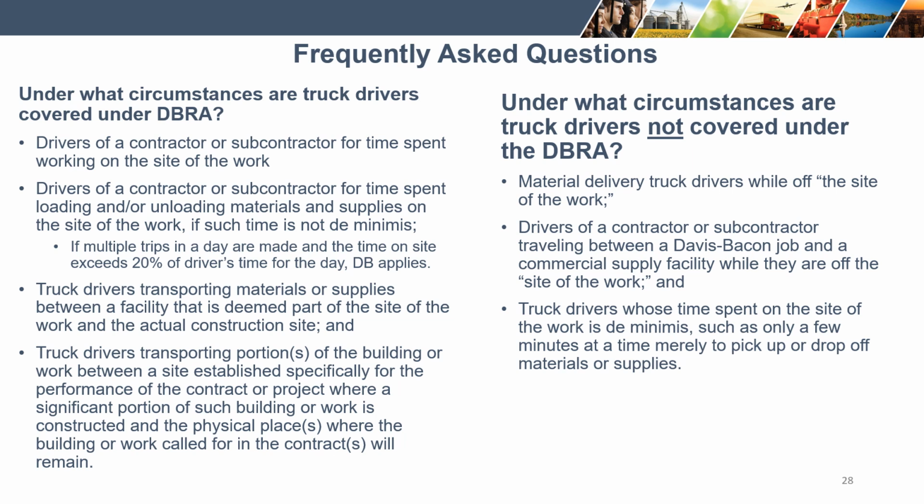Remember, less than 20% of their total time, such as only a few minutes at a time merely to pick up or drop off materials or supplies. Less than 20% cumulative for the day if they're making multiple trips.